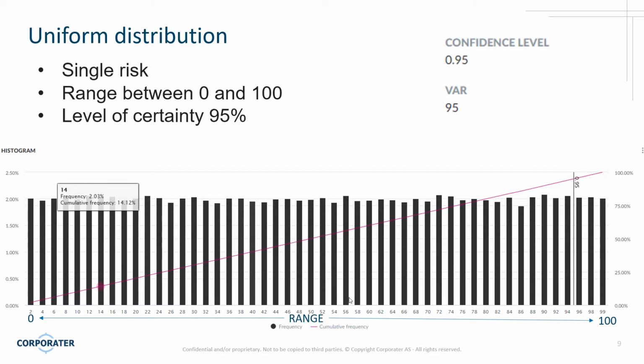So this result basically comes from a percentile. And what a percentile means is that we just basically stack up all of these random values from 0 to 100, all 100,000 of them. And we look at the 95th percentile in order, so that 95% of those values are at that level or below. So if we have 100,000 values, I would select the value at the 95,000th position. And since our data here is all neat and tidy, that value should be exactly 95, which makes sense. If my range was instead between 0 and 20, then the value at the 95th percentile would be around 19. And so far, this is really simple math because we're just dealing with one item.